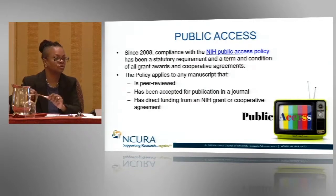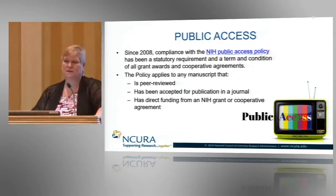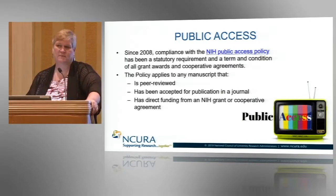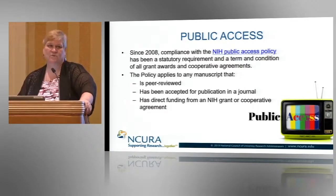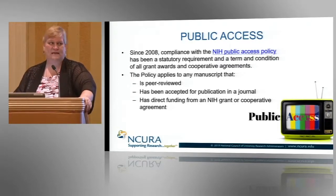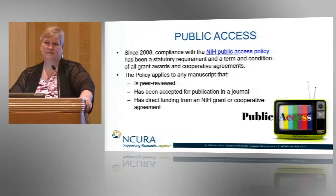So we want to monitor those carefully and make sure that those funds are spent down timely. Well, let me expand on the multi-year funded a little bit more because it's near and dear to my heart. For NIDDK, we have a special appropriation for type 1 diabetes. A lot of those funds go forward as multi-year funded awards. Our end date for those awards is always June 30th, and then we ask you to be sure to fully report your expenditures as of July 31st on that PMS report.